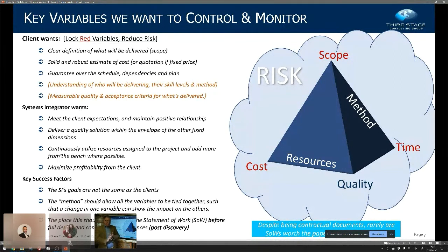On what basis has it been costed, and how is that commercial arrangement working? And don't assume that a fixed price is the best mechanism. Actually, in a lot of cases, it's not, because usually suppliers fix a price based on what they think the minimum viable product is. And then every time you come along, they will get their change book out and they will write up another change order. And so they'll increase their profit margin that way. And there are other more subtle and nuanced ways of controlling costs than just saying we'd like a fixed price, please.